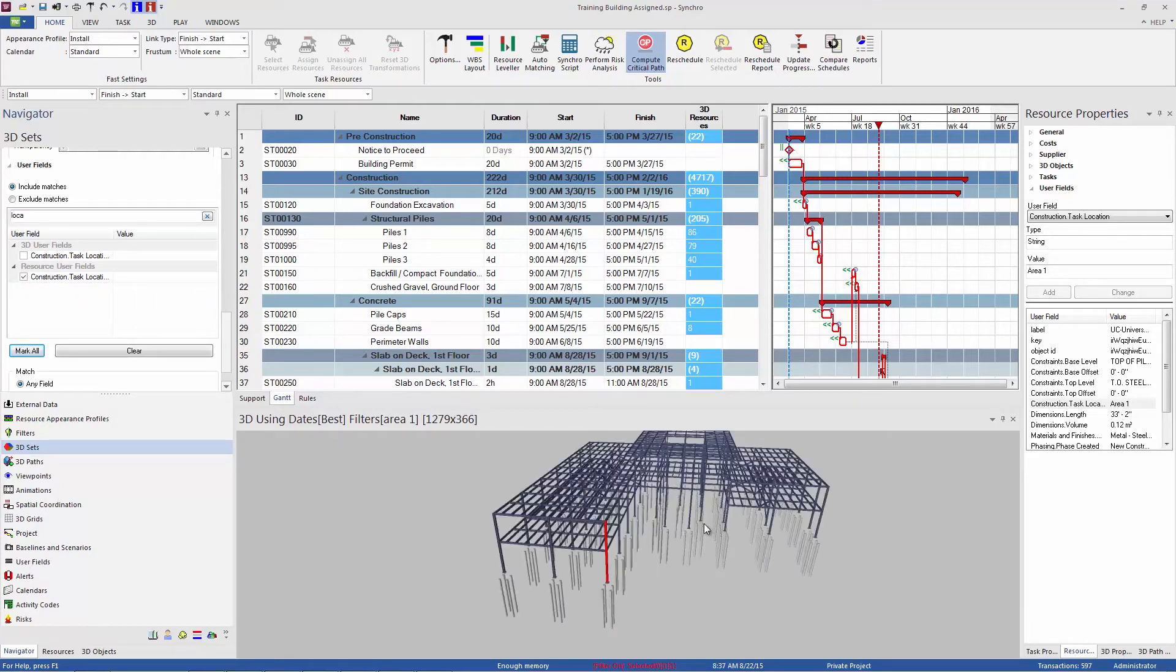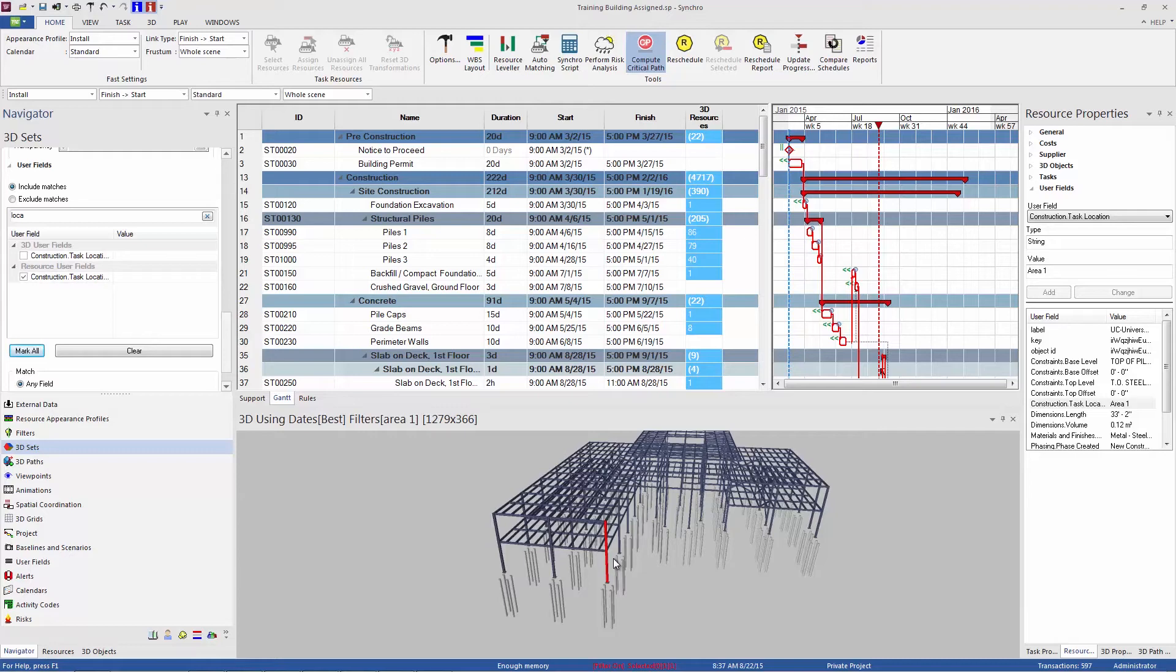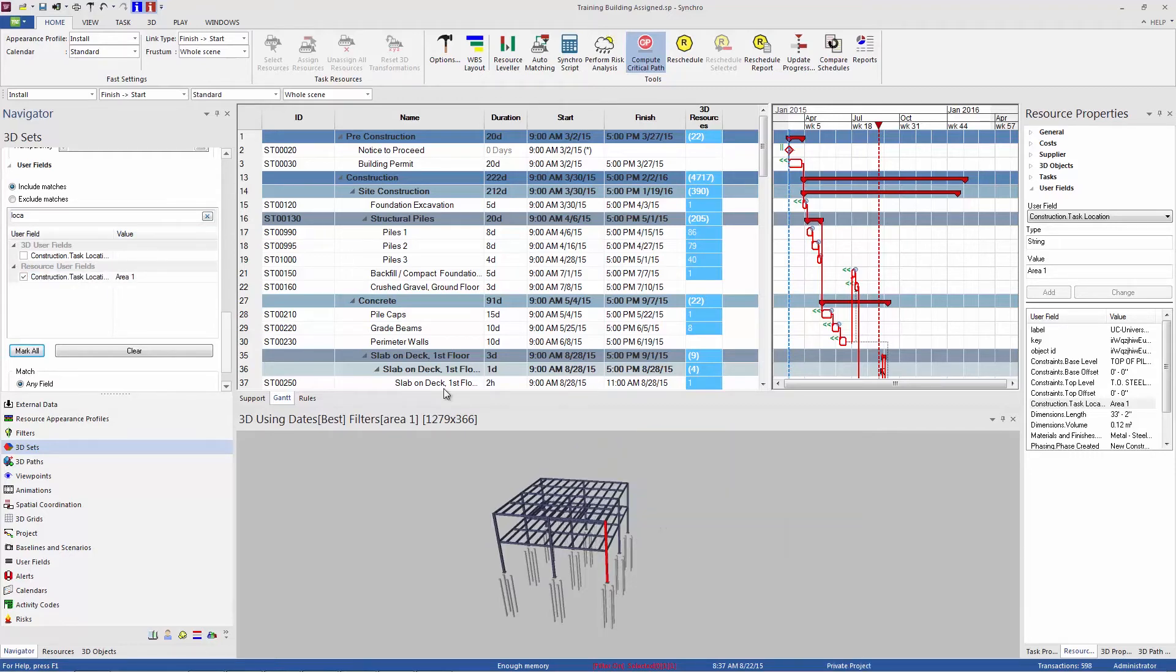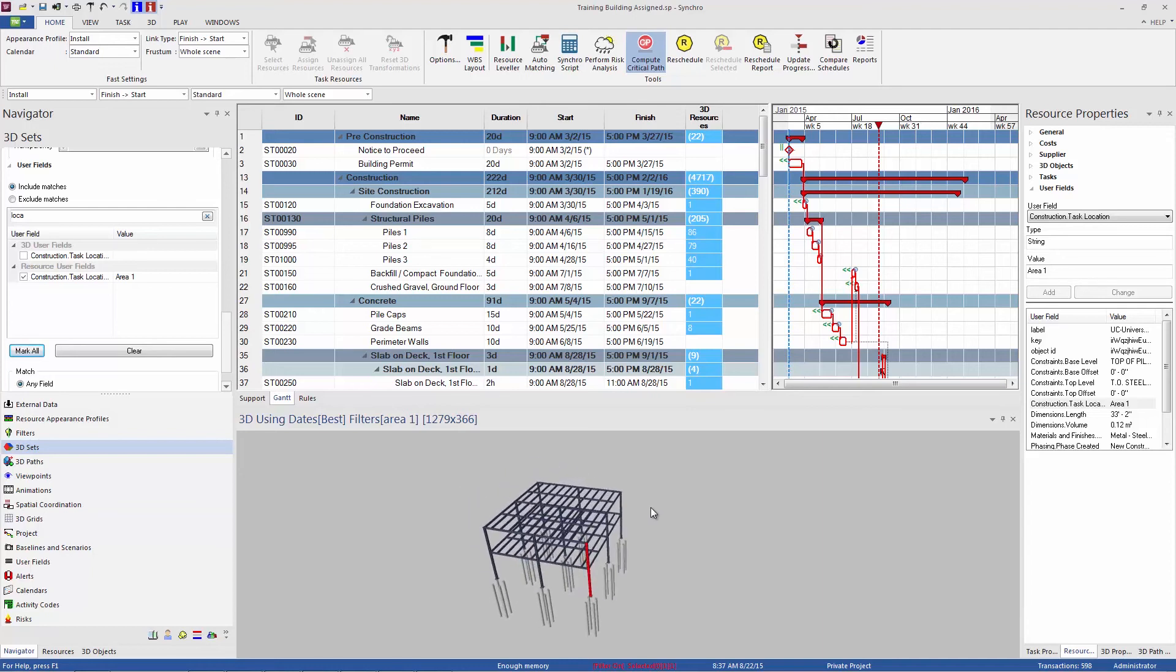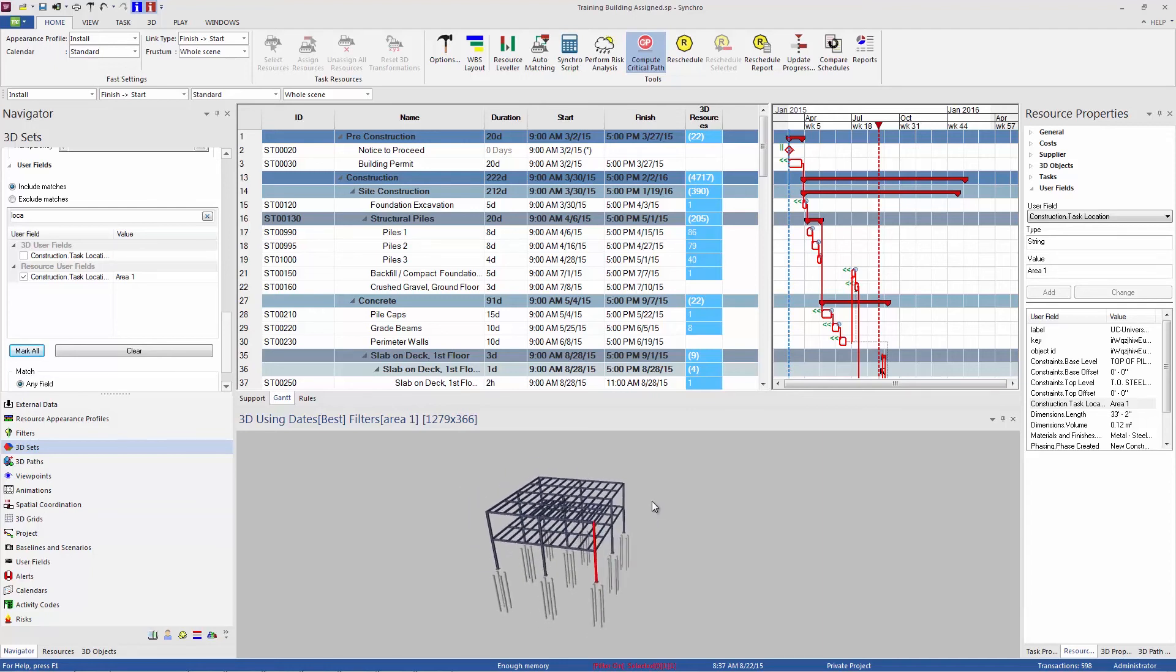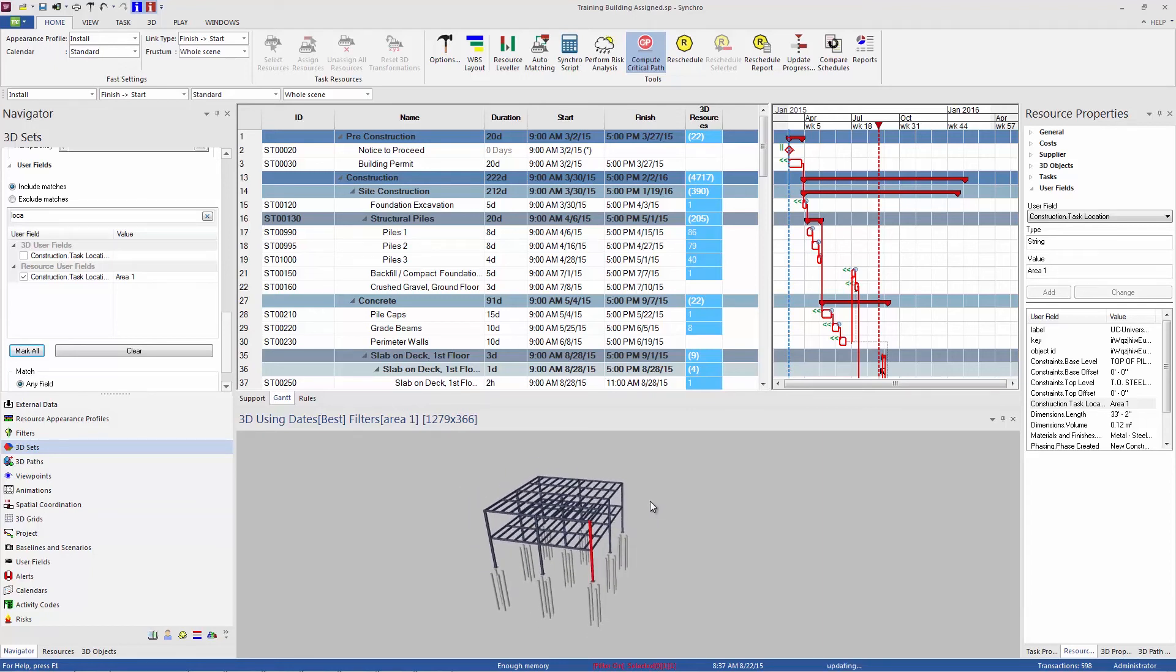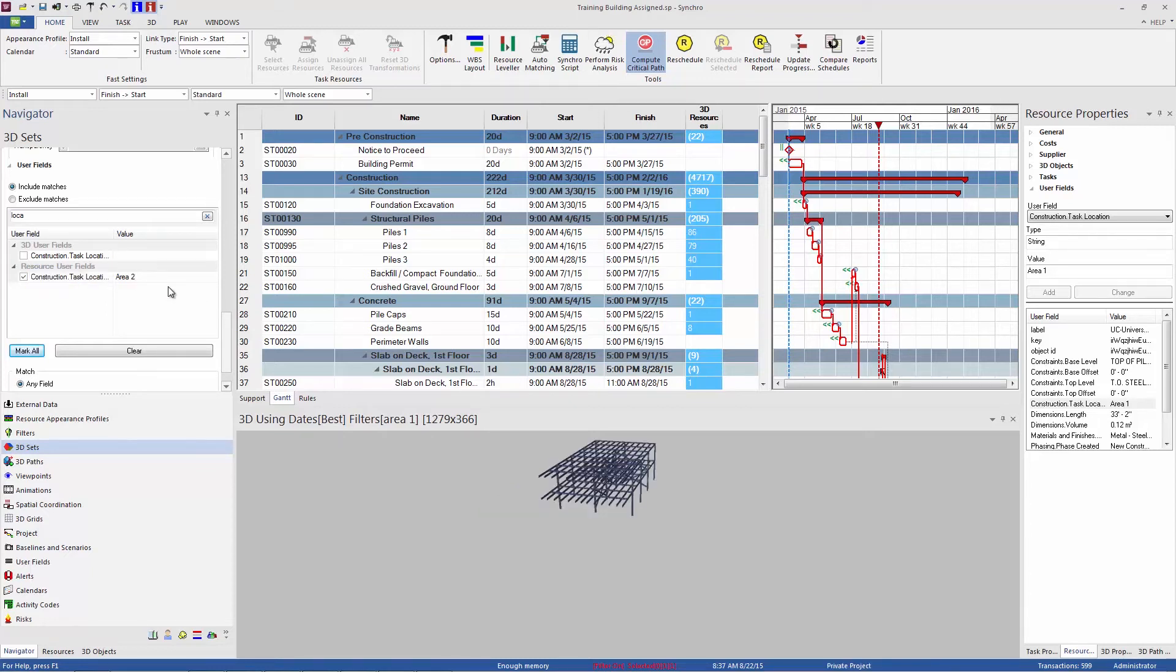So now I'm seeing in the 3D window all objects that have this particular parameter tied to it. If I want to look for all objects that have the particular value of area one, I'm just going to type that value or paste that value right here into the value column. So now we're seeing all model objects that have the area one for their task location. And we could adjust that value and look for area two, for example.